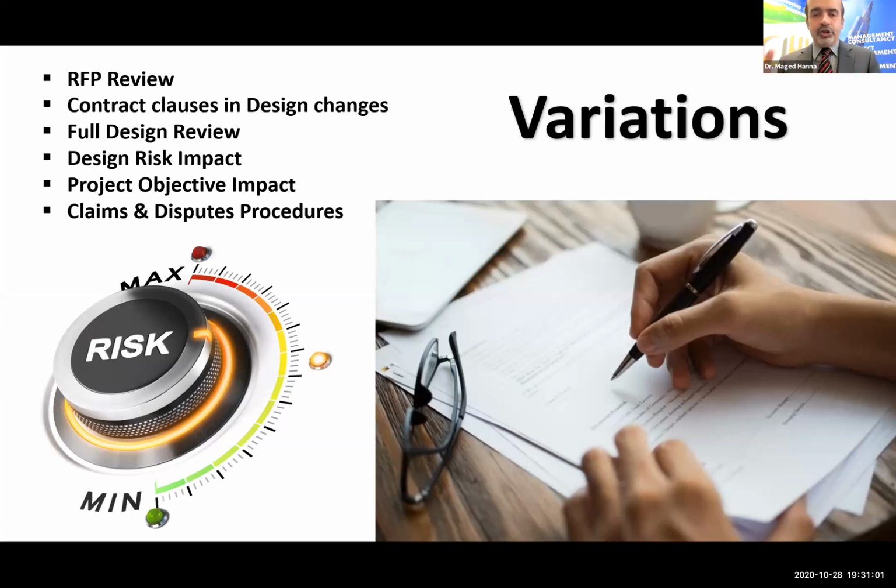Look for the design risk impact because of the variations. In one project, a variation happened, and then all the drawings were revised. That was all totally fine, and it was executed. But when we handed over, this variation had not been studied well. Now we have a lot of wasted areas, and there is no optimization over the structure. Why? Because when the change comes to the designer, he makes the change only in the area required. He doesn't look at the full impact over the design. He didn't look for the maximum optimization, functionality, sustainability, agility, innovation. He doesn't adapt all these factors I talked about today.